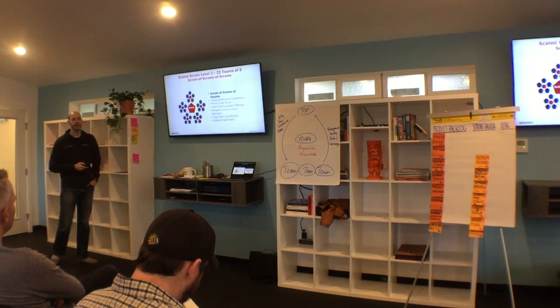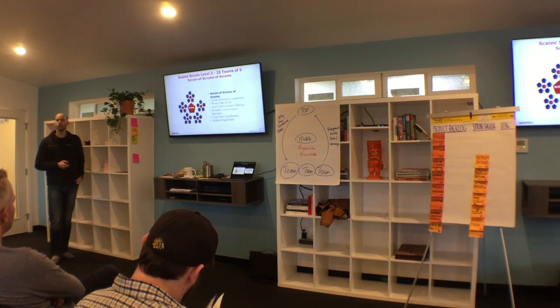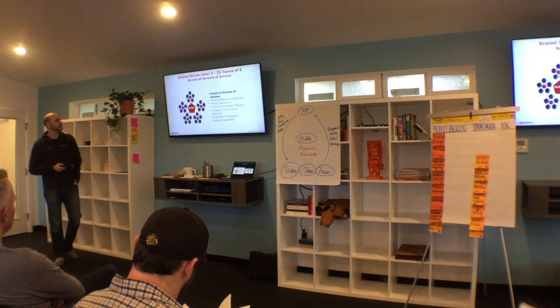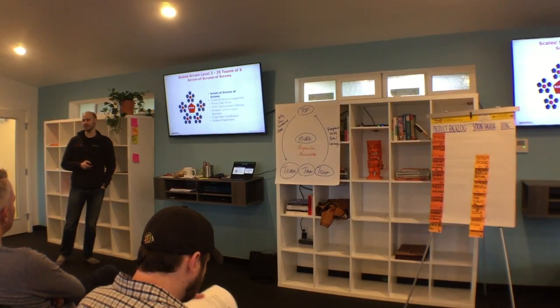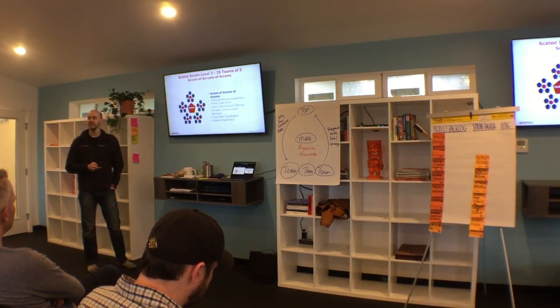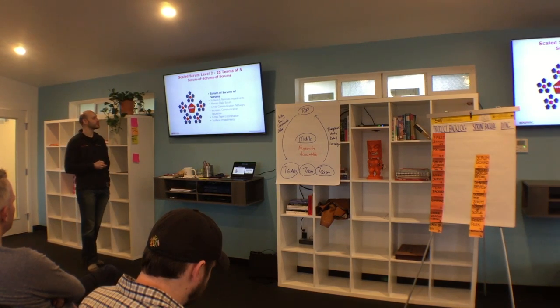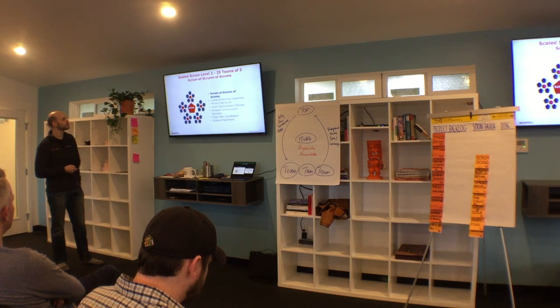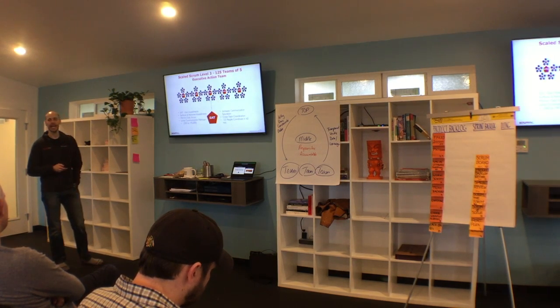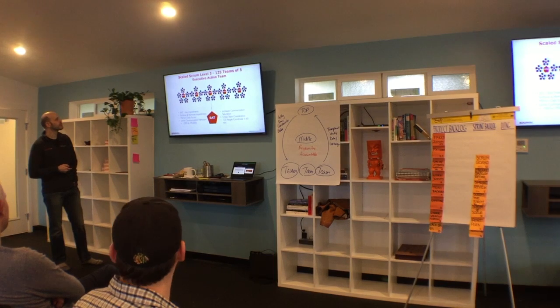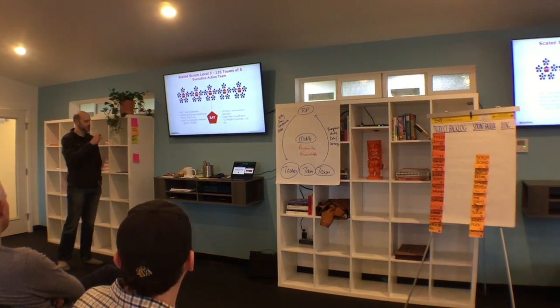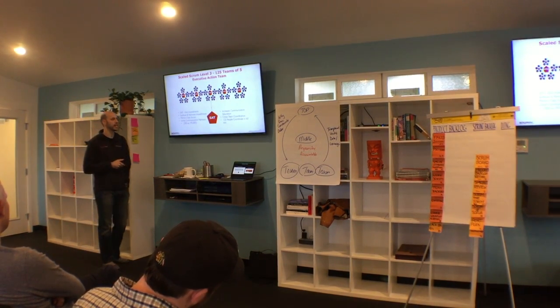Well, what if we have 25 teams? One person from each of those meetings attends the scrum of scrums. We've now consumed 45 minutes. 15 minutes, 15 minutes. This is our third 15 minutes, and that's 25 teams of scale. What if we do that again? Here's an organization of 125 teams. This is an actual model from 3M HIS.